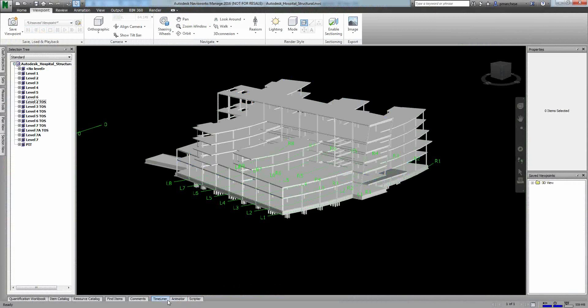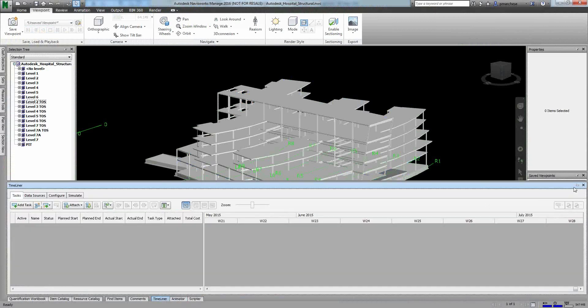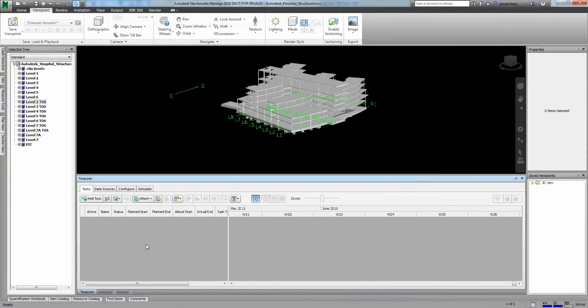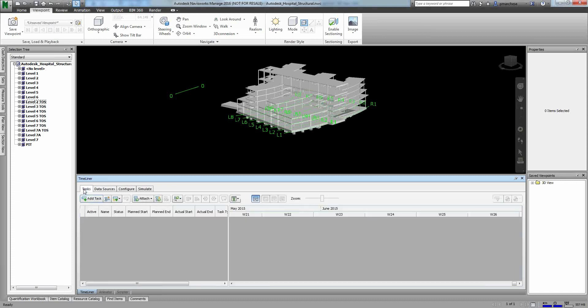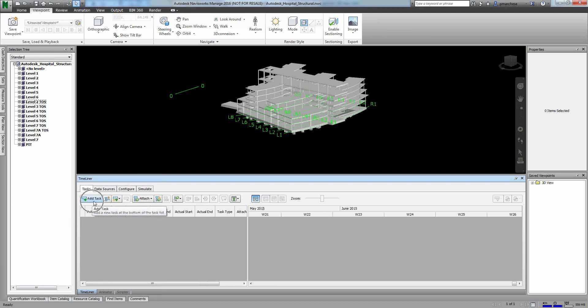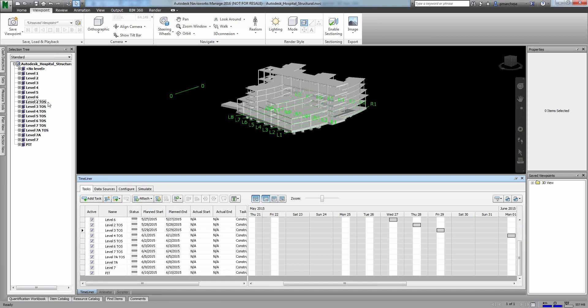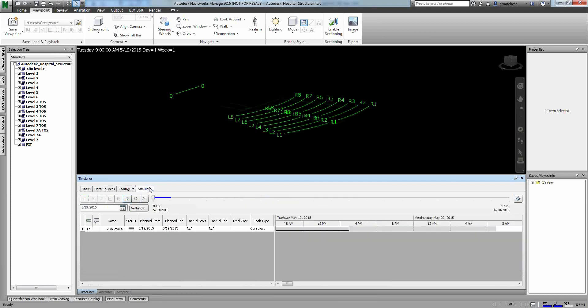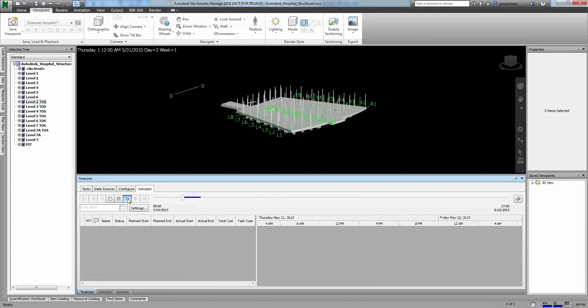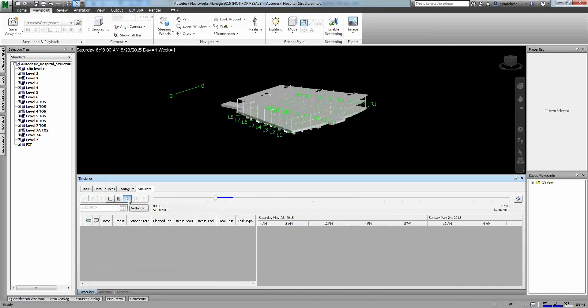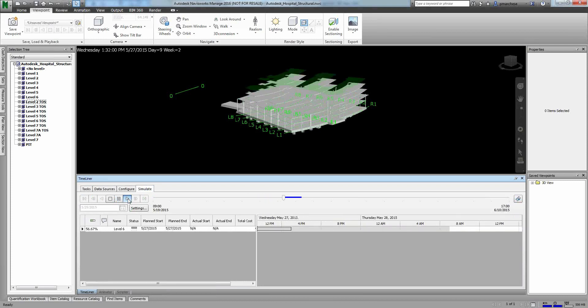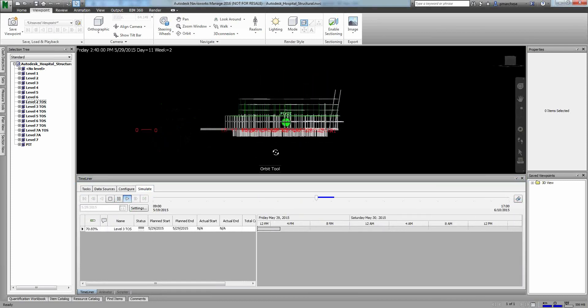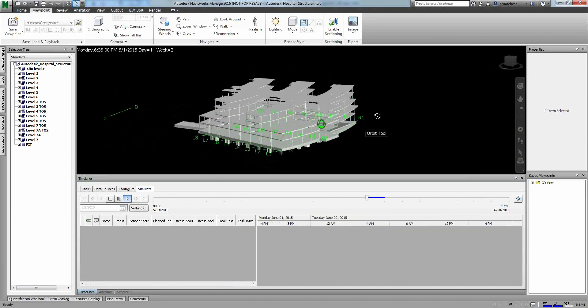Now, inside of here, I want to actually create a Timeliner. So I open up my Timeliner. I'll pin that down. And what I'd like to actually do is either go to data sources and add a data source. This allows me to connect information from an outside data set, whether it's Excel, Primavera, Project, and say the data in this field connects to this data in this field inside of Navisworks. I can create all the tasks that I want to work with here. Now, since I'm just going to do this very quickly, I'm going to say I want to auto-add tasks for every topmost item. So very quickly, I can do this. I also have every single one of my levels, this is the topmost item that I have, now actually has a task associated to it. If I go and hit simulate, that's it. So literally, that's it. I now have a quick Timeliner going through my project that I can then show.